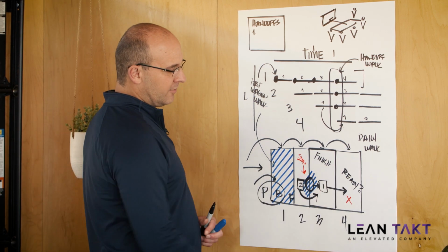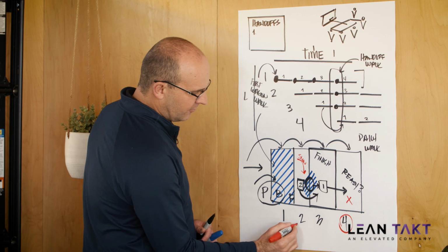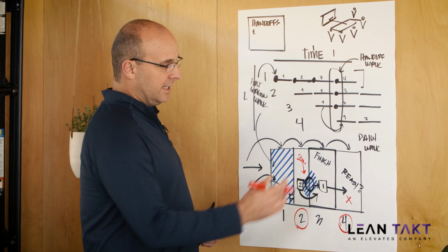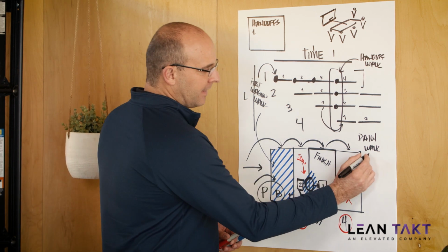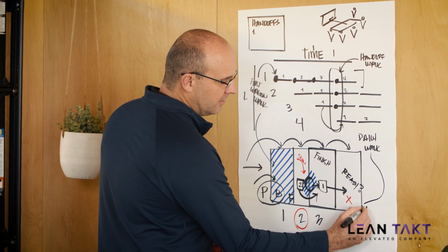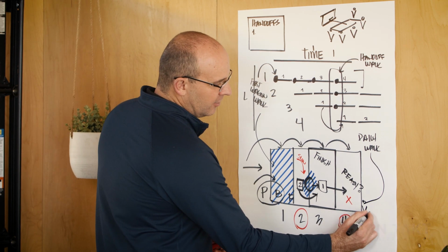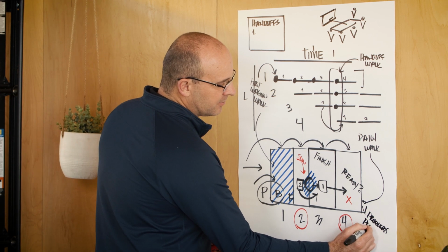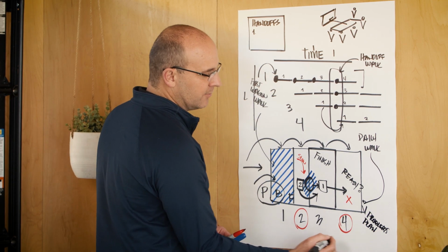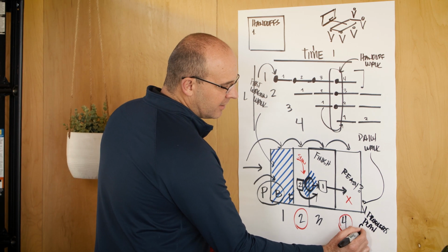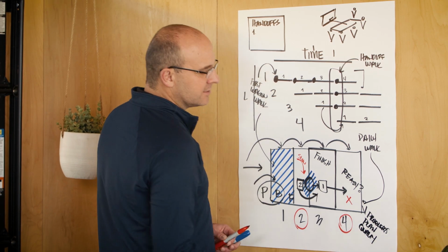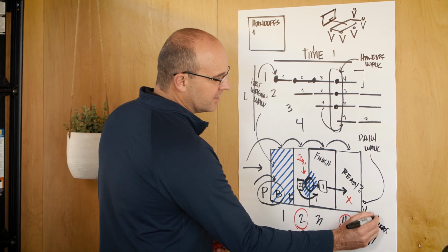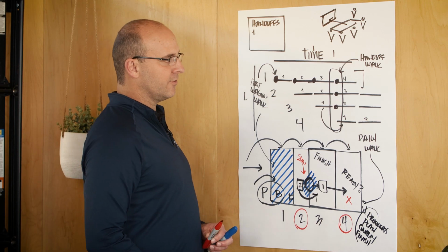And let's say out of all 4 of these zones, you know that zone number 4 and zone number 2 are the zones where you need to focus that day. In your daily walk, you will come and you will walk and have a discussion with the foreman and say, hey, what problems can I help you with? And while you're there, can we plan the next day's work with you and make sure everything's cleared out of the way? Can we confirm quality, that you're still installing your work the right way? And can we punch out the work as we go and finish? That is the conversation that you'll have with your foreman as you go.